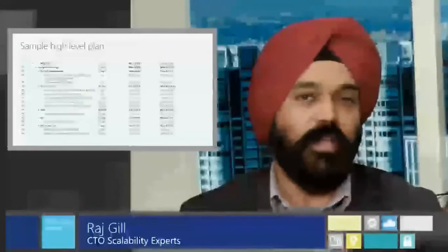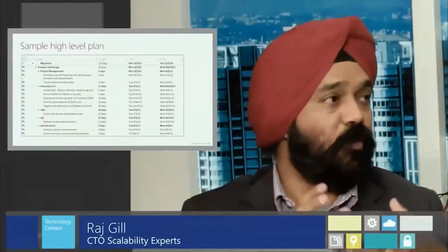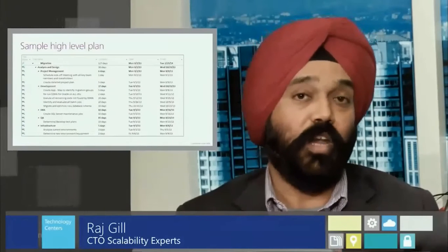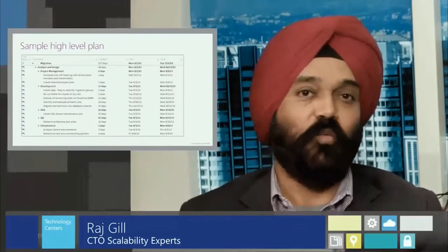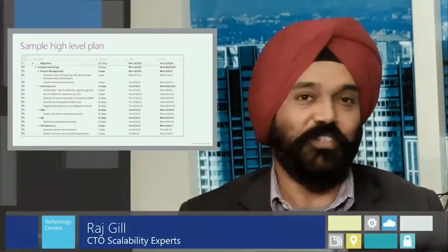But it gives you an idea of not only the total time, but also what percentage of time each division is going to be required to devote to this. So, for example, how much time do we need from the DBAs, and how much time do we need to allocate from the infrastructure team? You have to keep one thing in mind: all of the individuals involved in the migration project already have their day jobs, managing their current systems.